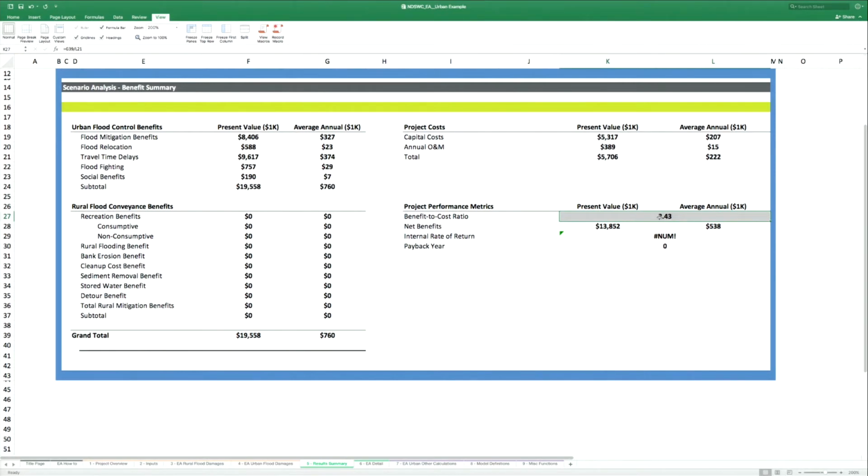And the results, probably the benefit cost ratio is maybe 0.2 or 0.3 different, I think, in terms of the actual end results. So again, kind of getting back to that idea of how close are we, 80, 90%? It came out pretty close in terms of comparability for the damages that the model was computing, even with those minor tweaks and reducing or trimming down the number of damage categories that we had in the model.